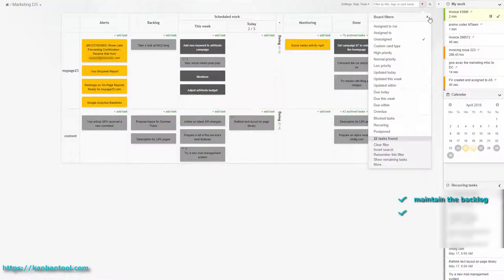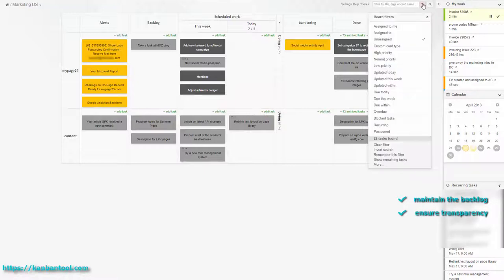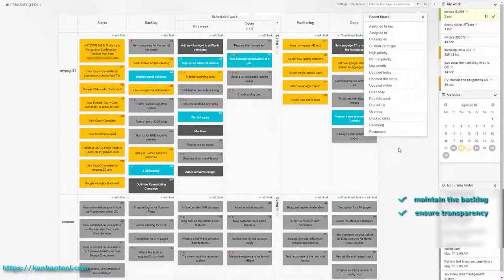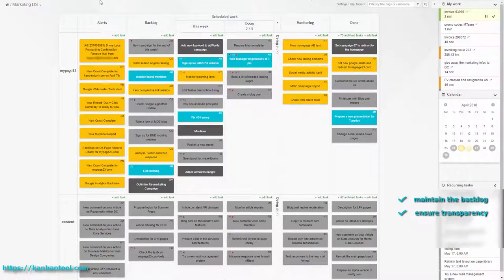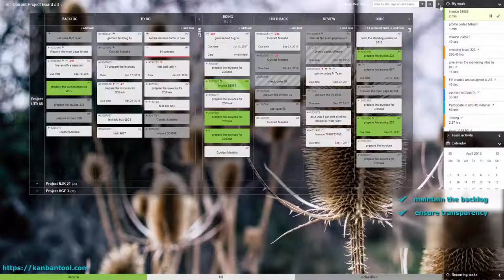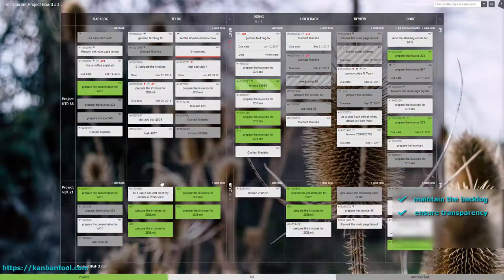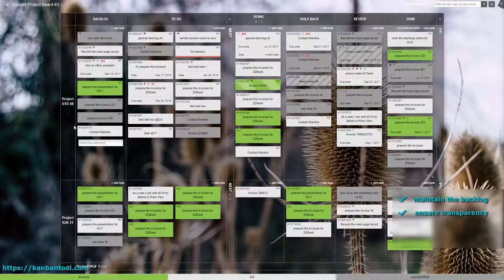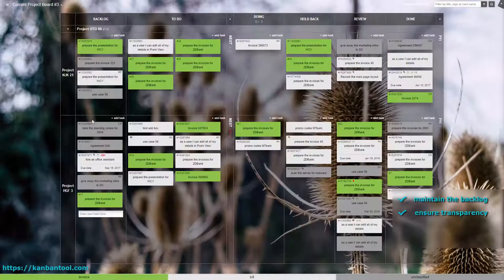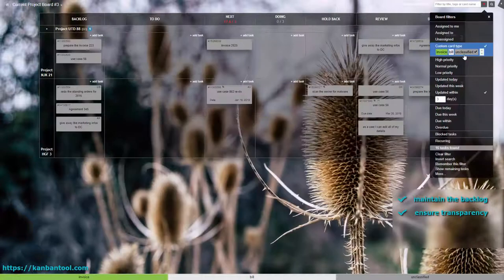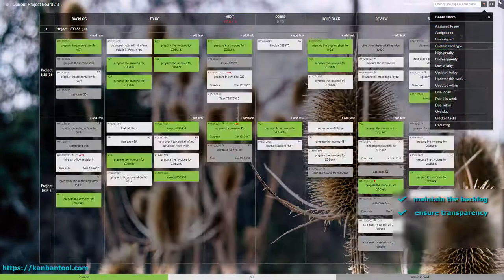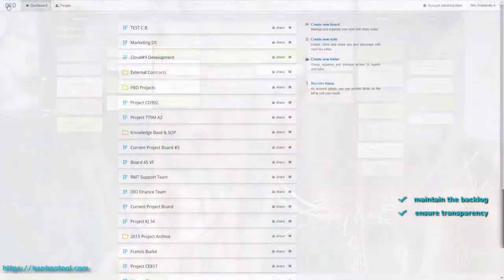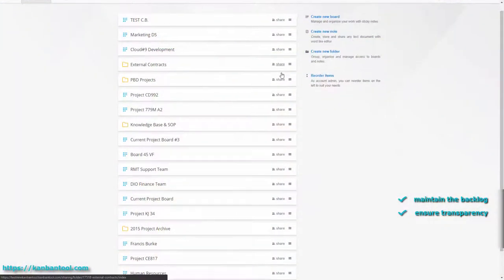Ideally, you want the work status of each team to be known to all other teams, so that product releases can be synchronized. This saves a lot of time and confusion. You can either make everyone use the same board with one swim lane per project and organize it so that actions of different teams happen on their portions of the work stages, or you can set one board per team and make sure all boards are accessible to all teams.